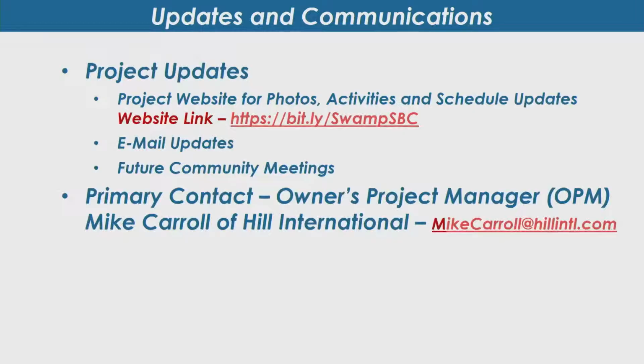But in addition to those, my name is Mike Carroll. I work for Hill International. Andy Vo and I are going to be your main contacts for Hill International. We're the owner's project manager. So our job here is to represent the school district in all matters, basically. We're there to make sure that the educational program gets developed. We're there to make sure that we're working towards permitting, and we're working towards community involvement. We're also there to make sure that the contractor is brought on board and that we're on budget and on time and on schedule.